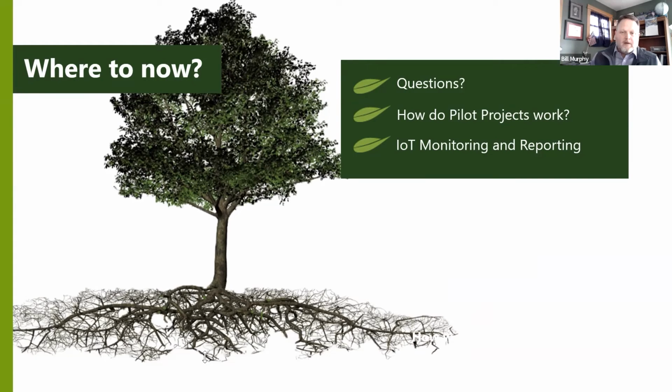Yeah, and he chimed in again. Good job, Steve. You answered it. He said the question came in as we were talking construction and using the geocells to avoid compaction during access. And so he got his question answered. That is another point I'm glad he said was access. We talk with pre-bid and pre-construction, during construction with contractors. Some of these underground systems, you can't drive any equipment on them. You absolutely can't. And you got to put 12 to 24 inches of cover on them. You got to protect them before you drive equipment on them.